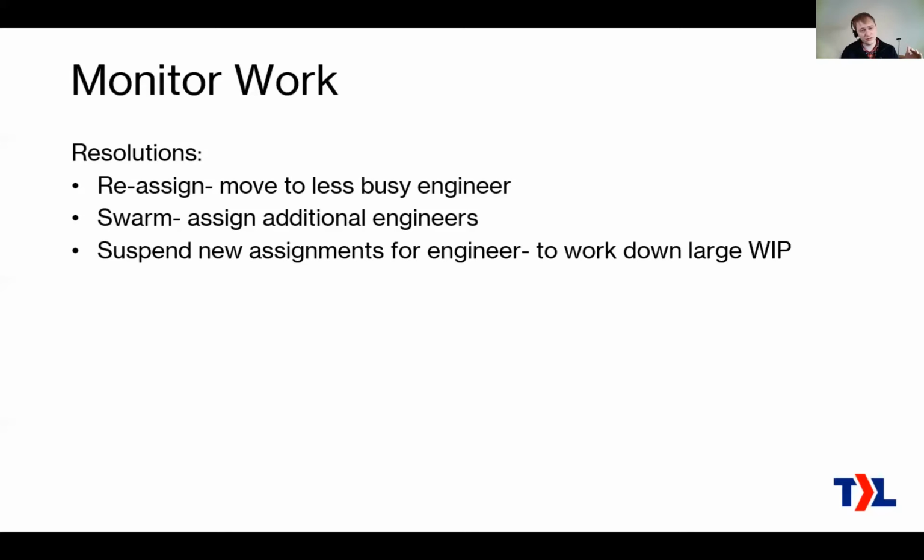Again, this is for bottlenecks, sometimes suspending assignments to an engineer, because they have a large work in progress, they've got their own big queue of work. That means you can't assign any new work to that technician for a while. Assign it to other people.